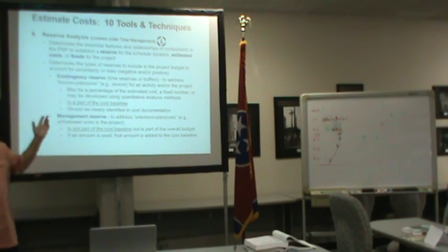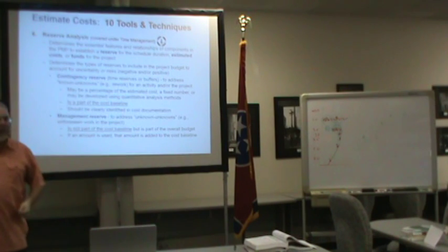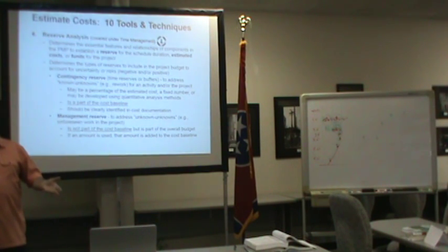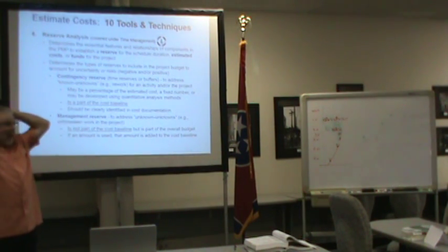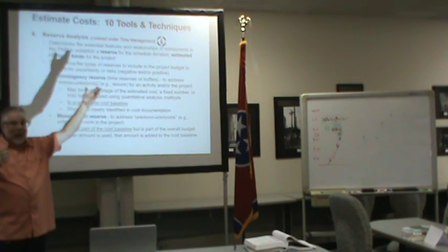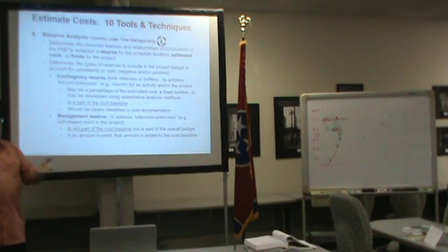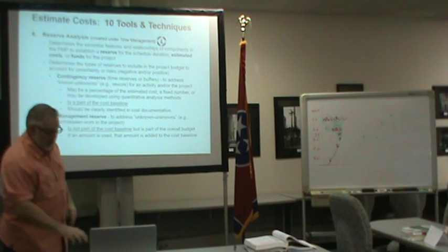You know, this is a $1 million project. We're going to set $50,000 aside, or $100,000 aside, or $5,000 aside, and we're going to call that management reserve. And if something happens we hadn't thought about, we're going to pay for it out of that. Now, can you make that same case for, holy cow, I can't win this work, but I'm worried about, right? So there you are, back into a management role or a management function.